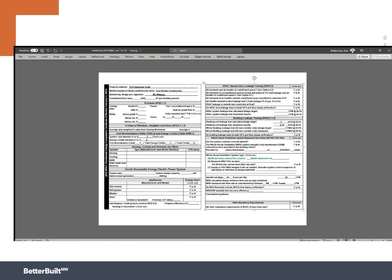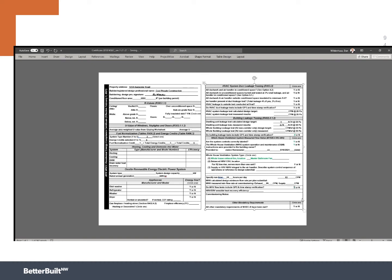Now this part gets really interesting. Do the whole house ventilation flow test include GPS and timestamp verification? So an easy way to do that is with your smartphone to take a picture of yourself doing the testing. Take a picture of the test results. Images are automatically timestamped and will usually be geolocated. So that's one of the many ways that this can be done. There's also software for recording all of that information. I'm going to say, yes, this was absolutely done. Keep in mind, each and every one of these are items that could be looked at by your authority having jurisdiction. The form is mandatory, but the better you do this, the more accurately you do this, the less challenges both you and your code official are going to have in making sure that this was done correctly.